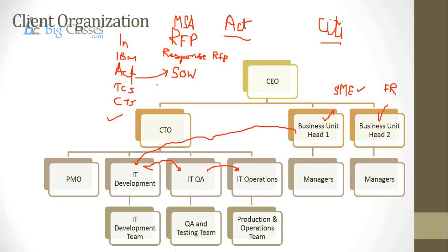Okay, now the statement of work lists down the scope of the project, what all activities the client and the vendor would do, what the timelines are, and any project-specific SLAs or terms and conditions. All that would be covered as part of your statement of work, SOW. Okay, so this is an important document for you as well, because you'll have to refer to this document to understand the scope of the system. Okay, so once the SOW is signed, then the teams are onboarded and the project would start. Okay, this is the process even before a project is awarded or you get onto the project team. This is what would happen.